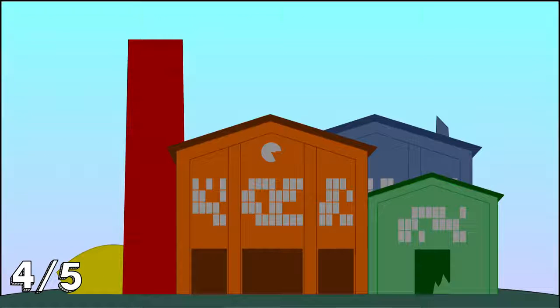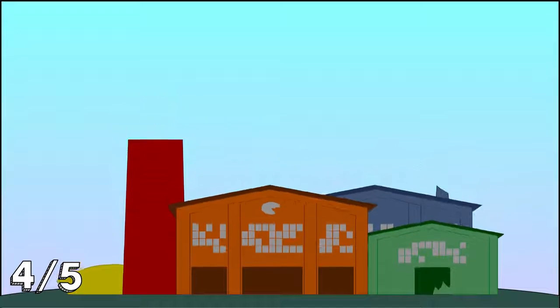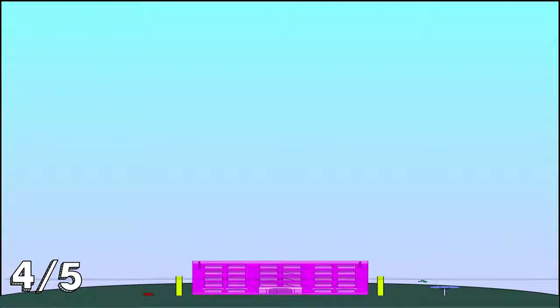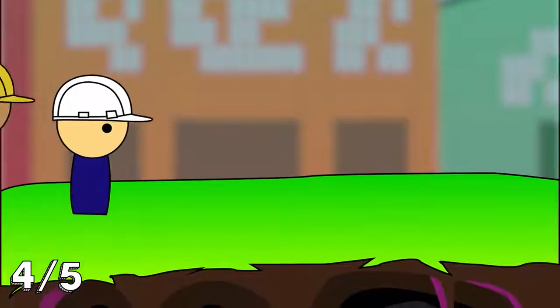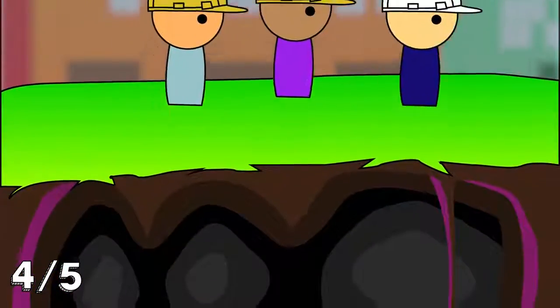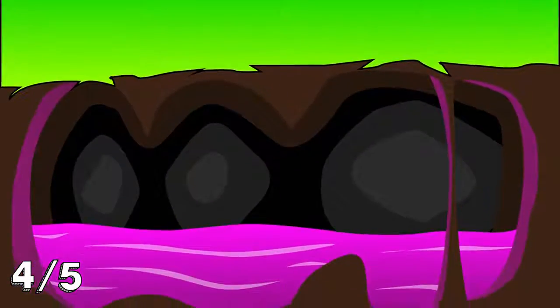The build qualification indicates that along with this no further environmental investigation decision, the decision is made to go forward with design and construction of the GSI project without gathering further environmental information. However, there is some probability that unknown environmental contamination may exist and will have to be remediated when encountered.